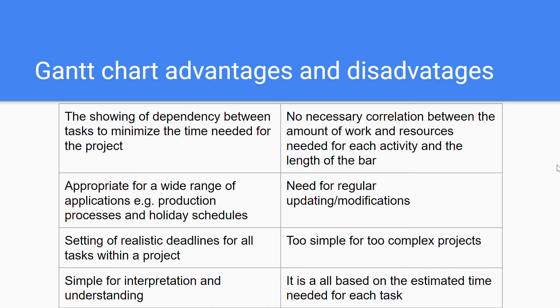So the advantages and disadvantages of this tool. The first advantage is that the showing of dependency between tasks to minimize the time needed for the project. And by this is also meant the sequential and parallel activities, so the managers can exactly see which task has to be done when, and this makes it more efficient, the whole process.